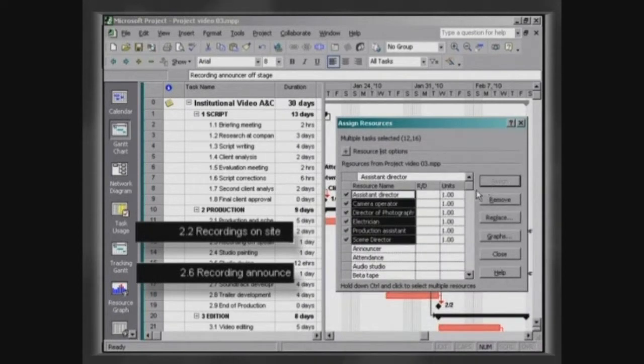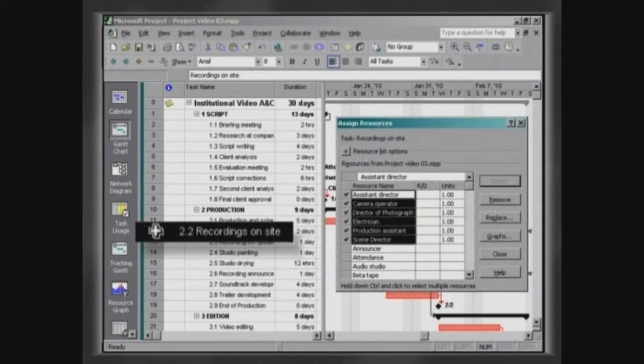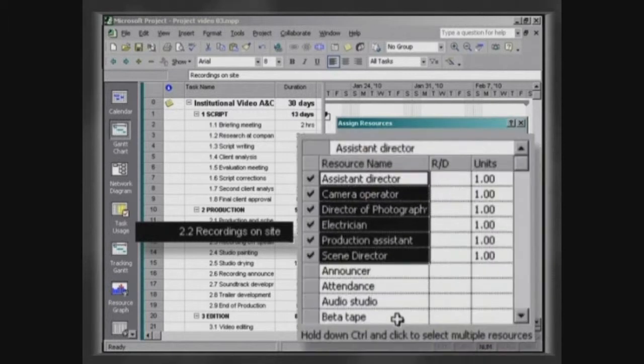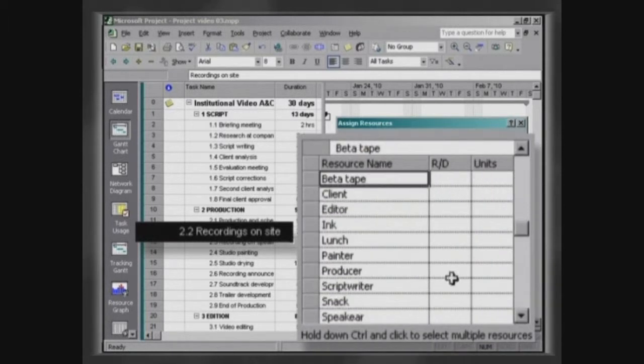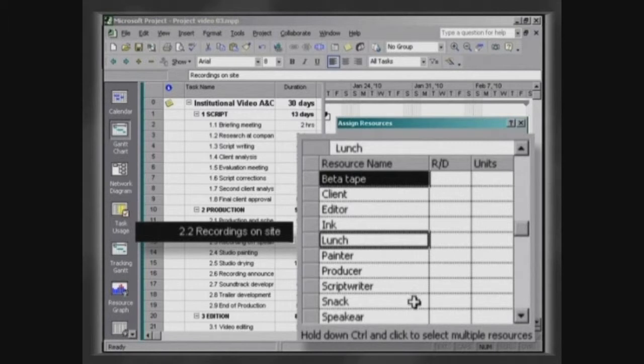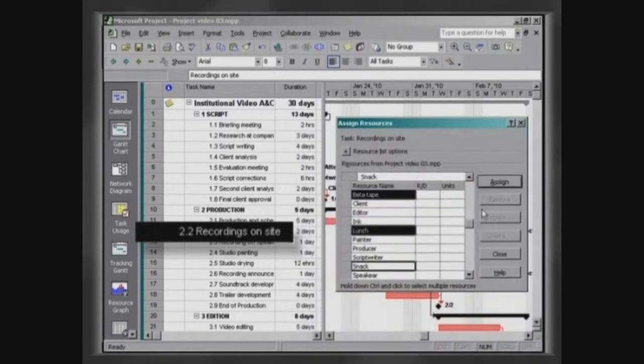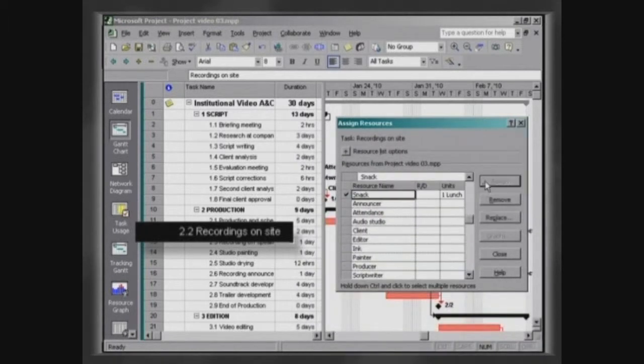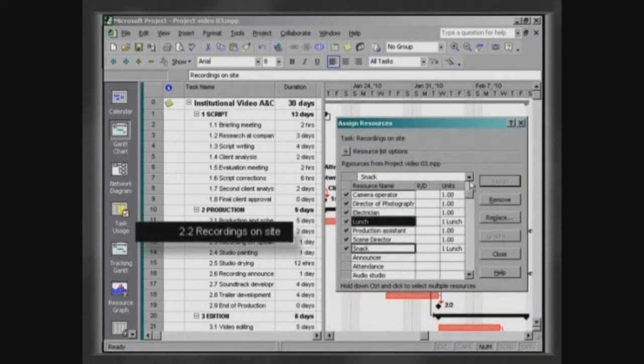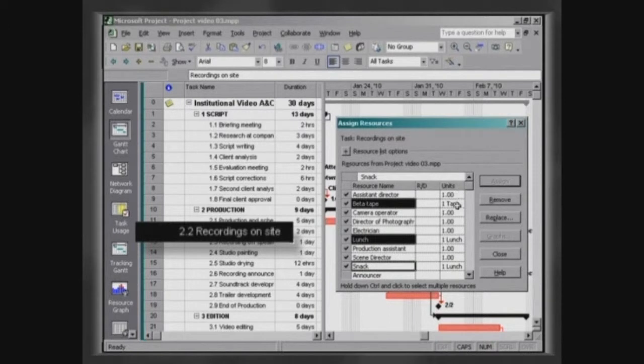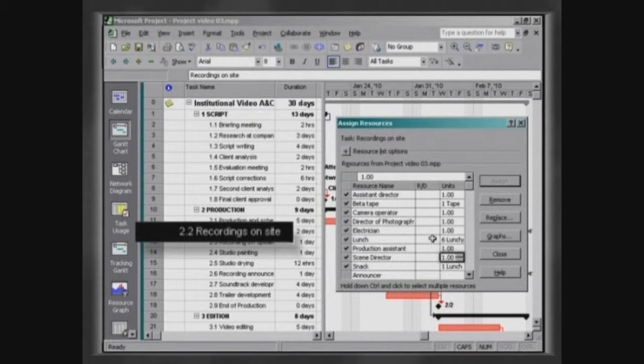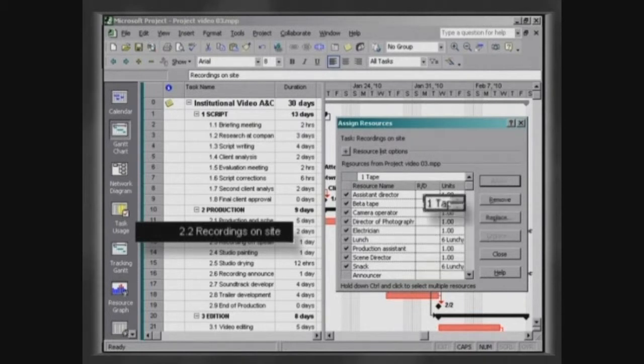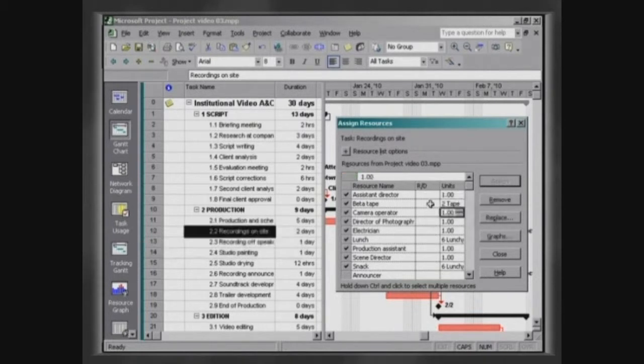Now only select Recordings on site to insert your material resources. Six professionals will be working in this activity, which will consume a total of six lunches and six snacks per day. In the field of the column Units, which refers to these resources, write 6D. We will need two beta tapes to make these recordings.